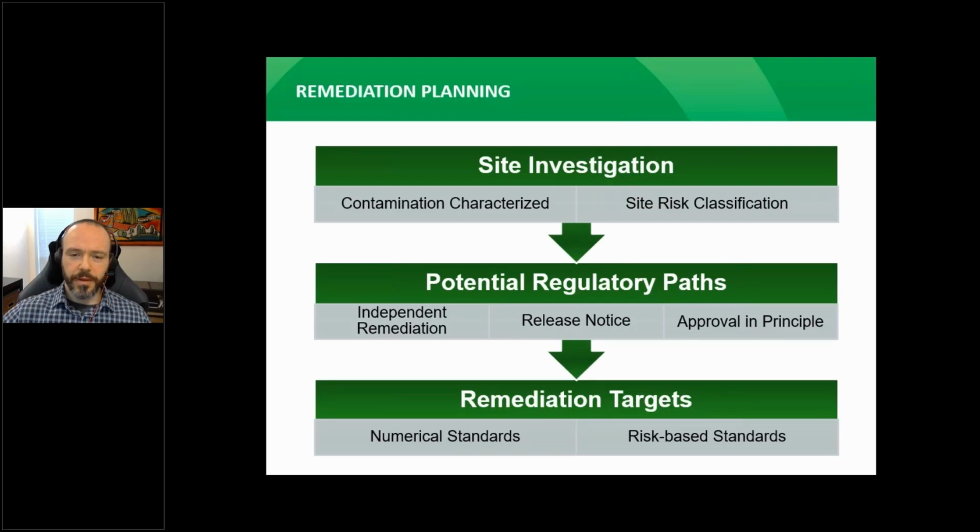The selection of a remediation solution often involves a decision to adopt remediation targets based on the application of numerical and/or risk-based standards, which Ingrid touched on earlier. Remediation targets based on numerical standards are likely to eliminate future reporting requirements and have upfront remediation costs.